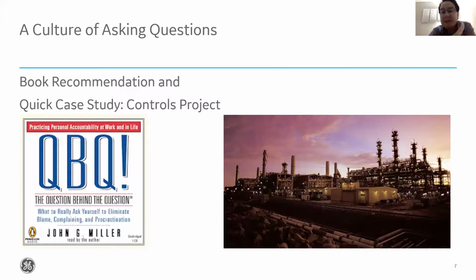Finally, the agreement was, wait, before we make any decisions or tell the customer anything, let's actually talk with them. So we went back to the customer and explained, look, here's where we're struggling. This was not part of our quote. You can see in our documents, everything we sent you. It's not part of what you asked from us originally. It's not part of what we considered in our quote. We're really struggling. We're not going to be able to do this for free. Help us understand, how can we solve this?